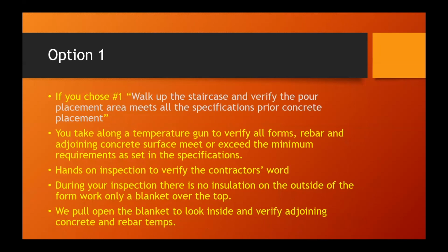So if you choose option 1, walk up the staircase, verify the pour placement area meets all the specifications prior to concrete placement. So on your journey up to the Pier Cap, you take along a temperature gun to verify that all the forms, rebar, and adjoining concrete surface meet or exceed the requirements set in the specifications. You do the hands-on inspection to verify what the contractor had told you.